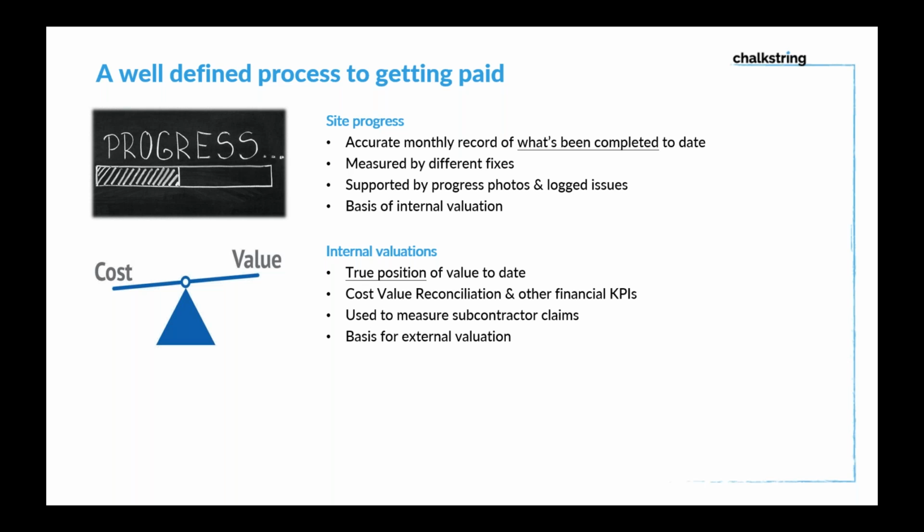So presumably, you'd want to only pay your subcontractors for the work they've done, or your labour-only subcontractors for the work they've actually done. So this is the benchmark or the internal valuation to be able to measure and make sure you're not overpaying your subcontractors. And of course, then that becomes in itself the basis of your external valuation out to your client.